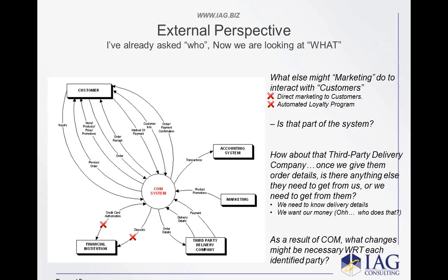By the way, for the project managers out there, each of these lines on this chart is an interdependency that is either true or not true. And if it's not true, then you've got a major problem with the project. You may have a failure on your hands if you realize that you cannot share information in this way. So you need to stop and think about this and start looking at the techniques that you can use in here.